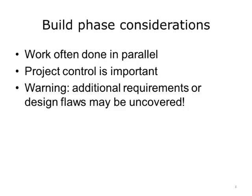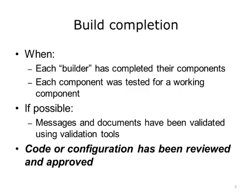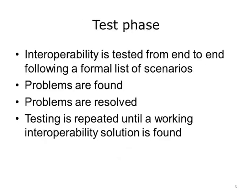It is not uncommon for additional requirements or design flaws to be uncovered. The build phase is complete when each builder has completed their components — each has been tested and each builder believes they have a working component. If possible, messages and documents have been validated using validation tools. Finally, the phase is completed when their code or configuration has been reviewed and approved. When the build phase is complete, you can move into the testing phase.